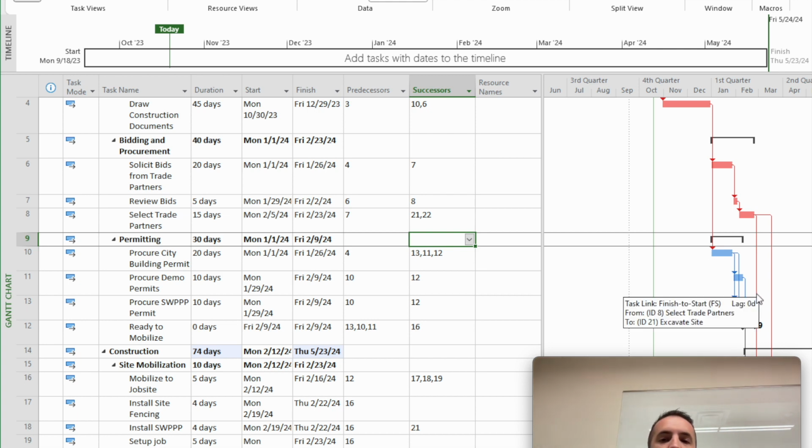So you'll see as you infill activities and you find open-ended activities that the critical path may move based on that. That's why it's so important that as a rule for all of you in my class, when you are creating your activities, every single activity has to have a predecessor and a successor.